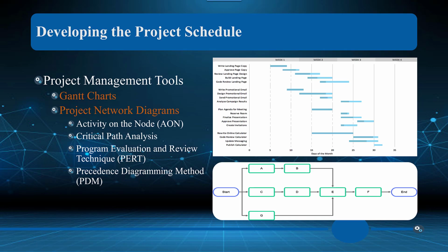So here's an example of a 4-week project, pretty simple, where it sits, the different colors. This is how much has been completed. This is how much still needs to be completed. As you can see, we have an overlap in some of these tasks, which means we don't have to complete this one. They're not sequential. They're not necessarily exactly concurrent like these 4 here are concurrent. We're starting them at the same time, but notice we have some dependencies that list for next steps.